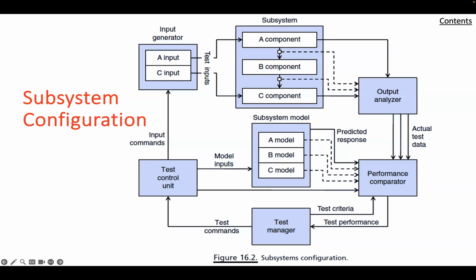Faults encountered at this stage are more difficult to trace, costly to remedy, and have a greater potential impact on overall program cost and schedule. Hence, more detailed planning and direction of the test program are in order. Under these conditions, the application of system engineering oversight and diagnostic expertise are even more essential than in the earlier stages of system development.